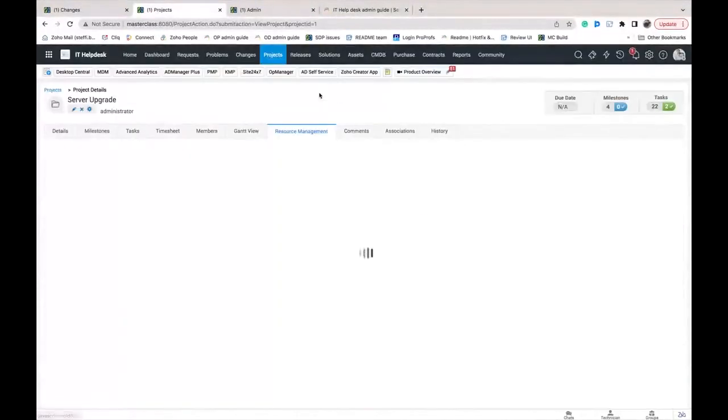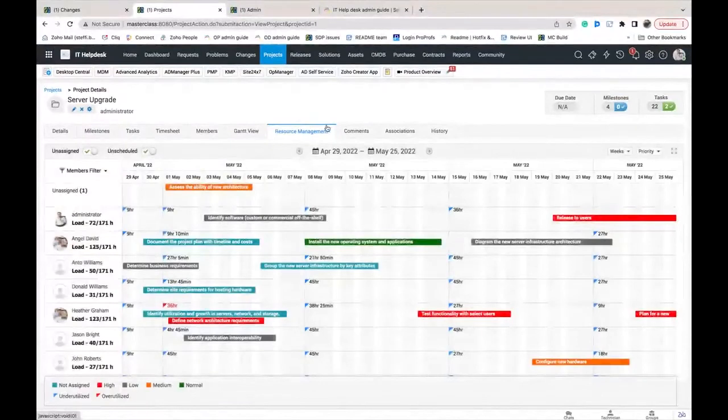You can view the comments, add the work log, or you can instantly update the scheduled time and the actual time and so on. So once you've configured all of this, you can then go to resource management. Instead of the Gantt view, where you planned the time or the project schedule, in resource management you get an overview of the workload of your project members and you can plan how many tasks and which tasks a person should be completing and so on.